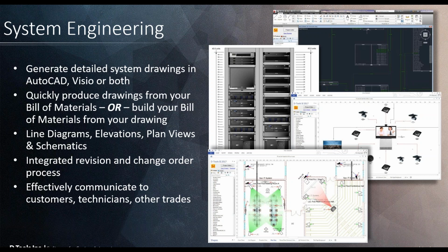You can build a rack, you can do a wiring diagram, and as you build a drawing, it actually creates your equipment list and helps you put together that budget at the same time. So you'll get not only your equipment pricing, but you'll get your labor estimates and all the other things adding up as you go. And that's a really big deal when changes start to happen on your projects. That's oftentimes another challenge people have: whenever change orders or revisions happen, things can easily slip through the cracks. You may forget to update it in one place, but you updated it over here. So with our system, when you change it in one place, it changes everywhere.